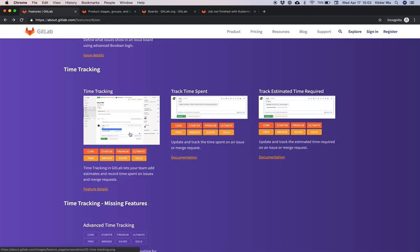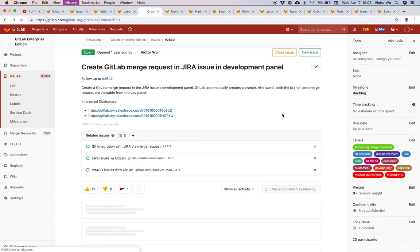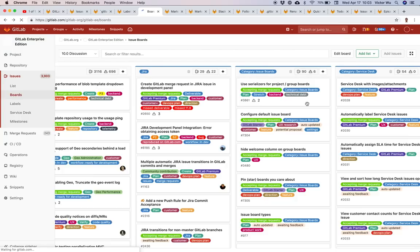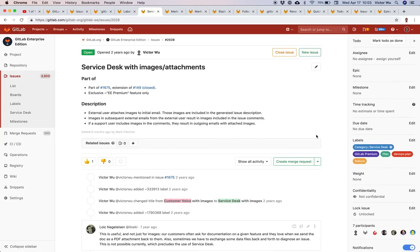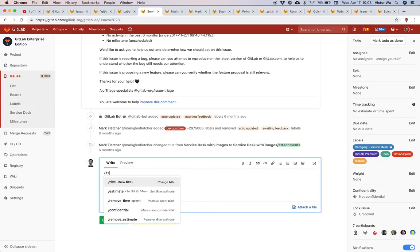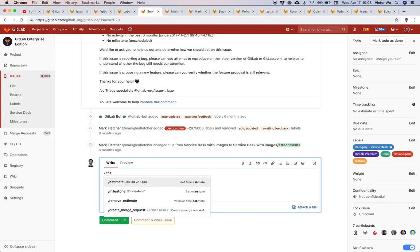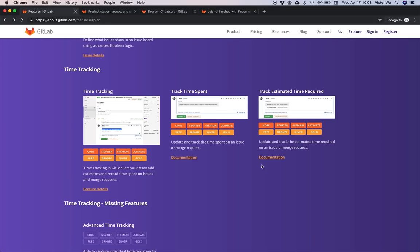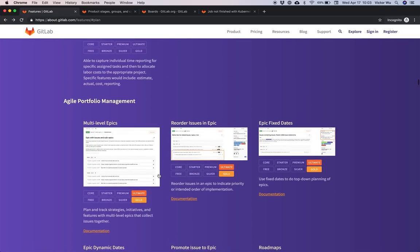Time tracking — you can go into any issue and enter time tracking information. You can add or remove time spent, and estimate how much time it will take. That information will be populated in the sidebar. So those are the three time management features.